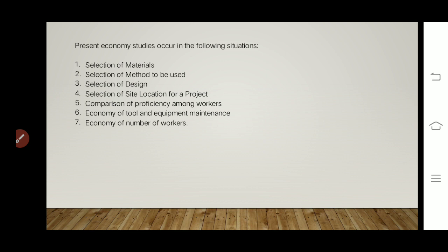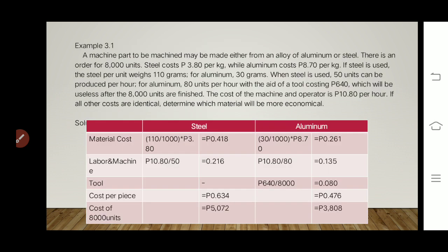So, let's say, dito naman kasi ang pinag-uusapan is, halimbawa, yung duration ng isang project, aalamin mo yung more economical na numbers ng workers, para matapos agad yung project. Kasi, let's say, hindi mo matapos within a time, magde-decide ka kung magdadagdag ka ng tao or magbabayad ka na lang ng liquidated damage. So, now we have an example here.